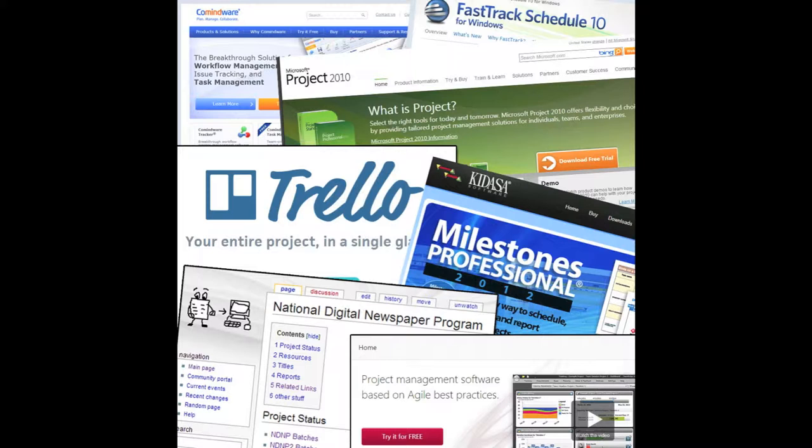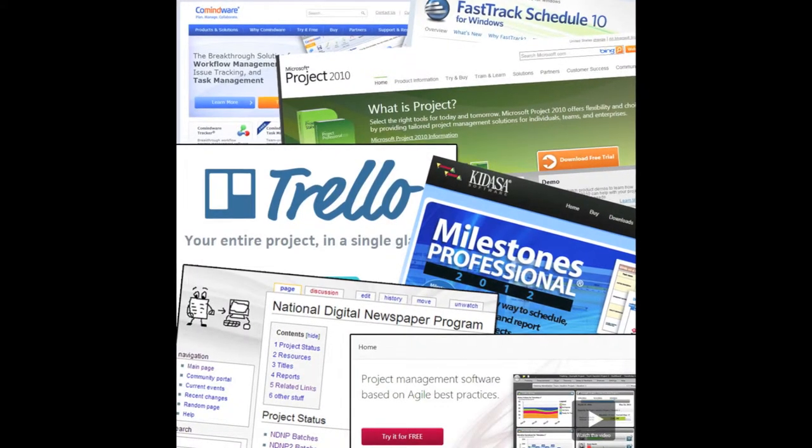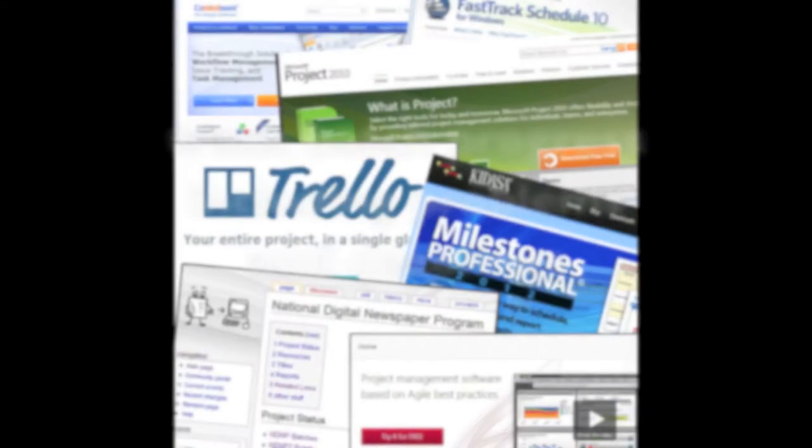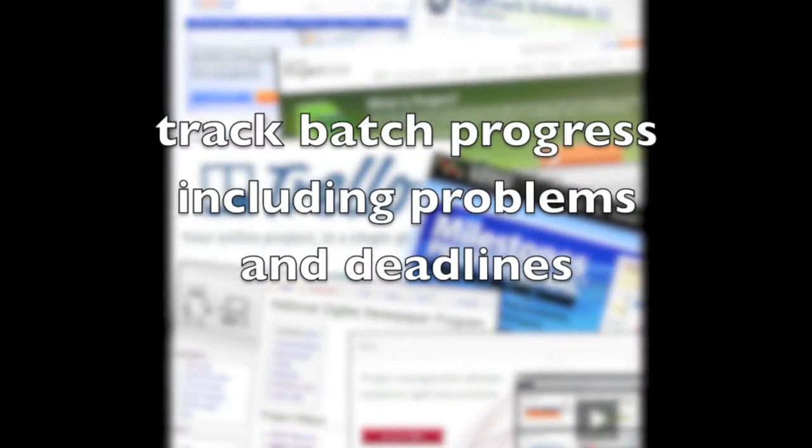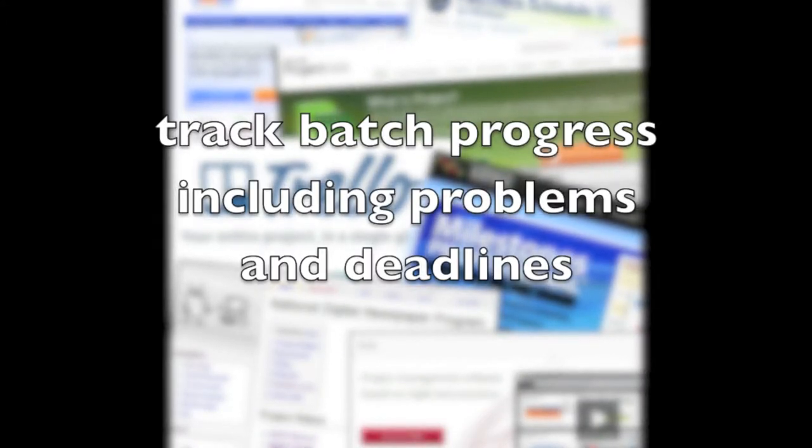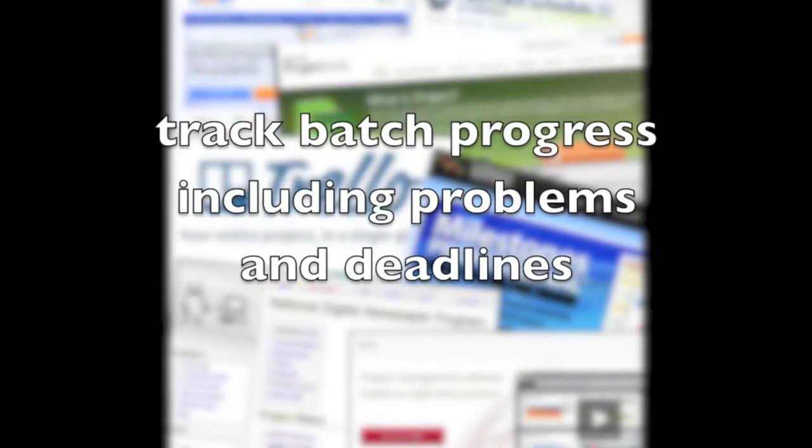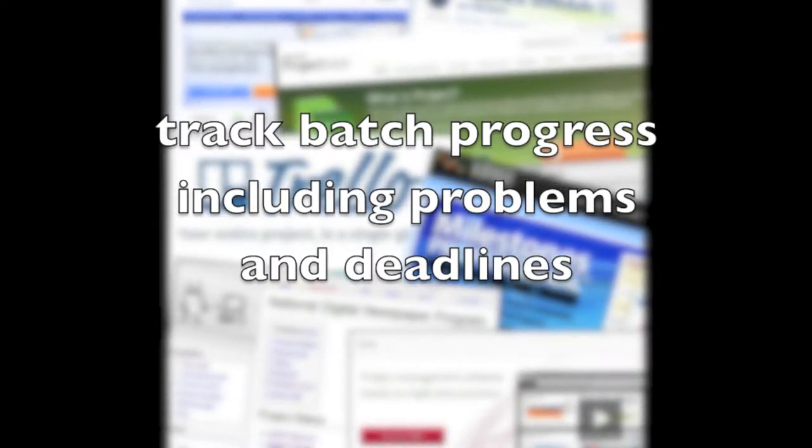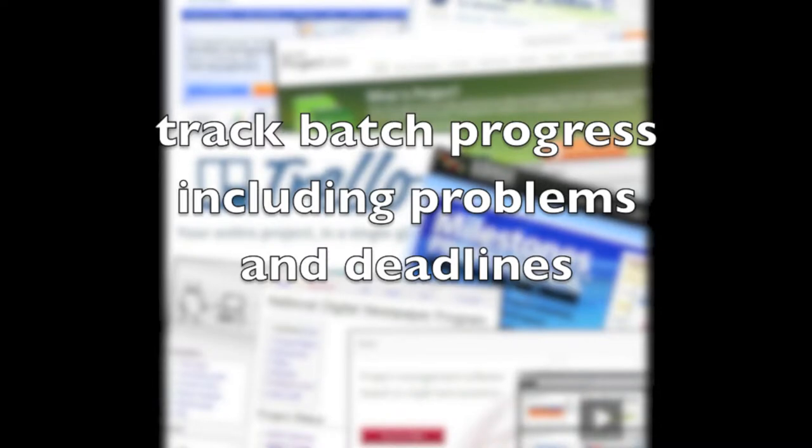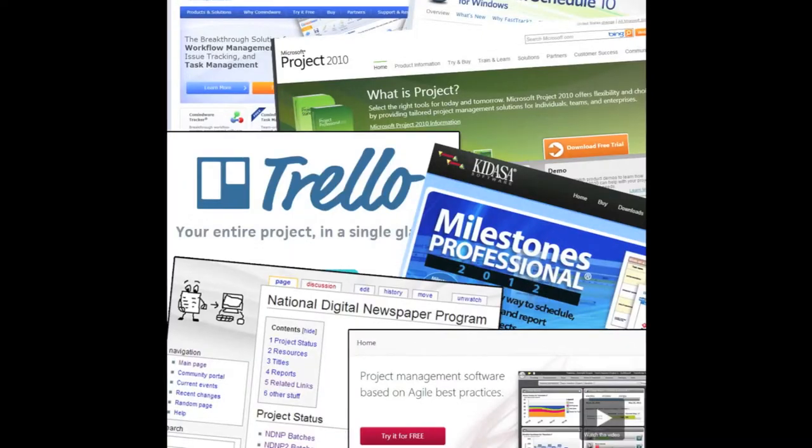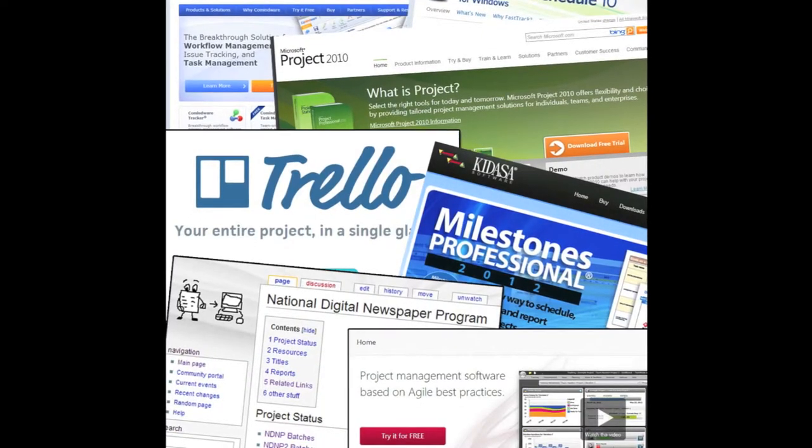Project management software, publicly and privately accessible wikis, and shared document interfaces seem to be popular approaches to managing awardee and vendor workflows. Whichever tool you choose, you should be able to track the progress of batches, the types of problems that occur with batches over time, and the schedule of deliverables to ensure that you are meeting important deadlines.